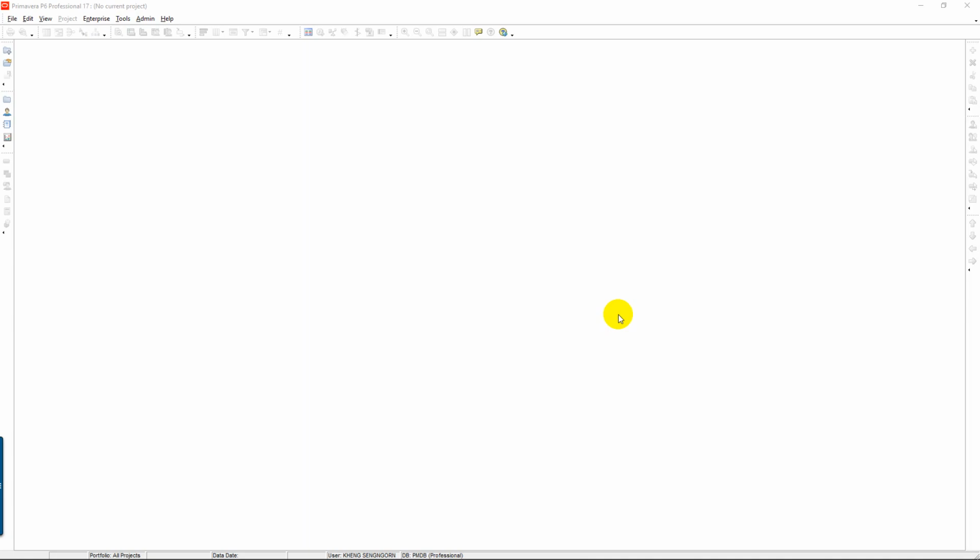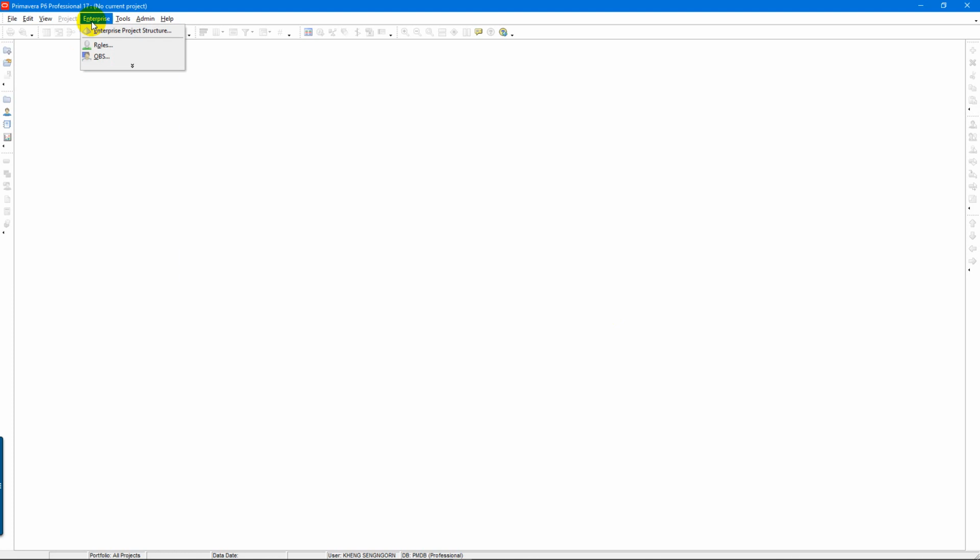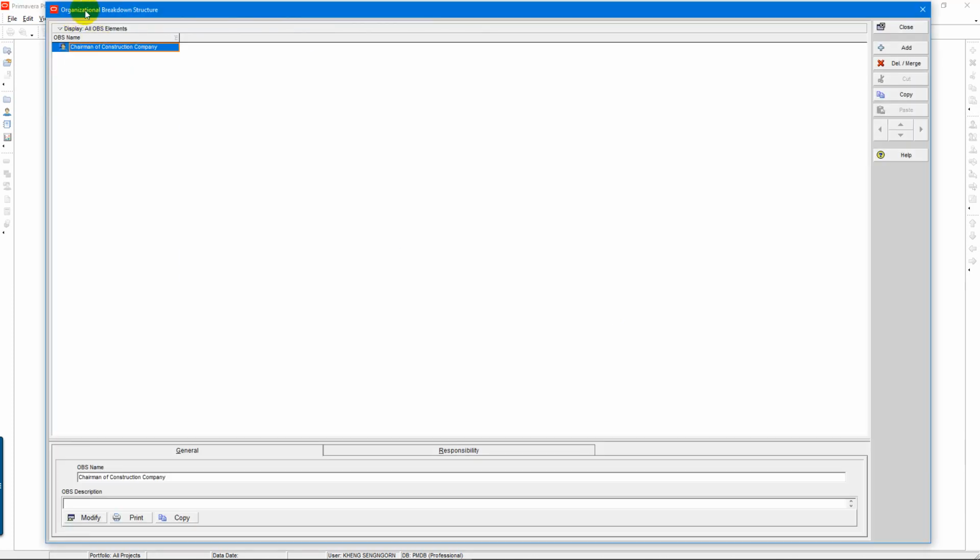In this part, I would like to show all of you how to create organizational breakdown structure. So now let's start all together. We go to Enterprise, we go to OBS, or we call organizational breakdown structure. And then we assign who responds for this company.